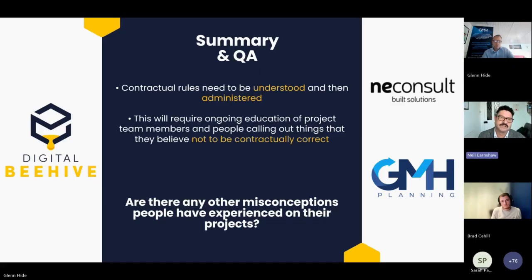Okay, but what does that mean? What's the project? It's not a defined term. And then it says in carrying out work. Well, what is work? Is that physical work on site, or could we also recover the other contractor's prelims for the delay? So I think there are a number of challenges with the drafting that make it uncertain for parties, to be fair.